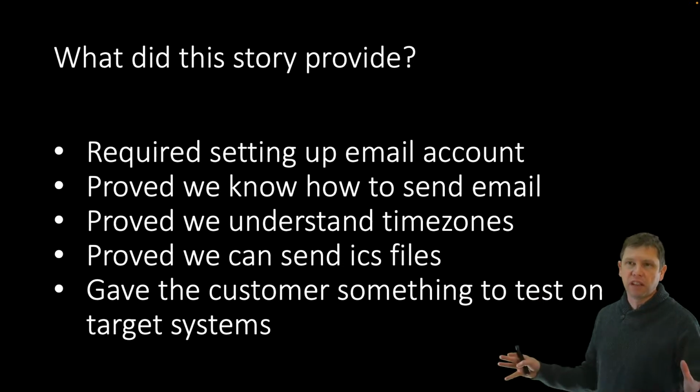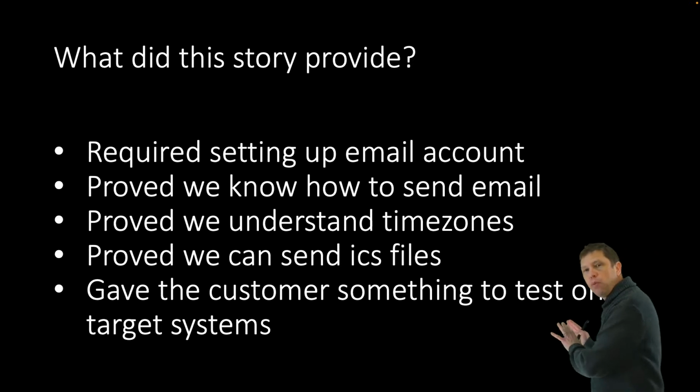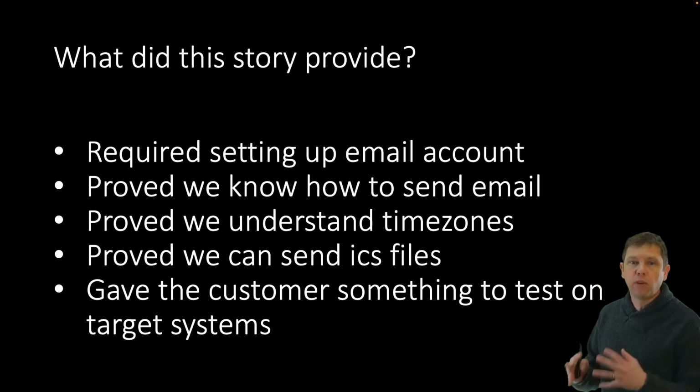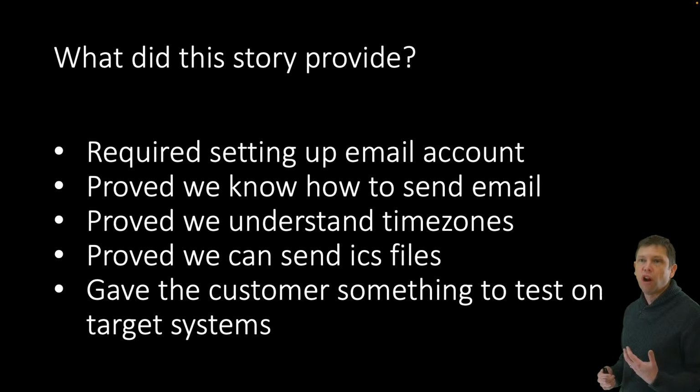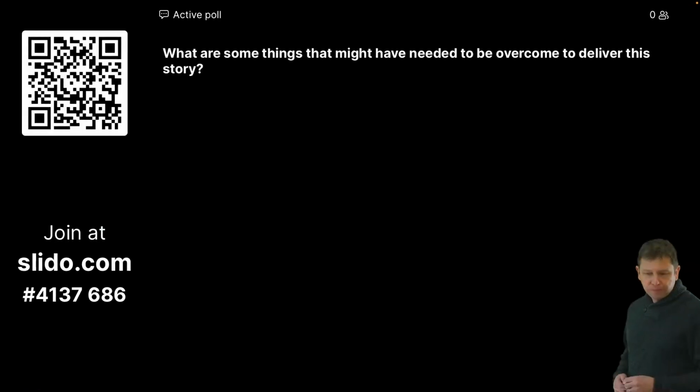Maybe there's all these things that can go wrong. But we've moved a lot of that risk all the way to the very beginning because we've got this really, really simple form that lets us try it at the very beginning of the project.